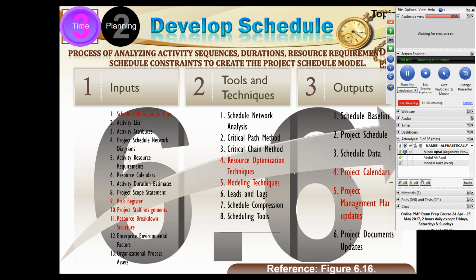Does this happen? Yes, sir, it can happen. But for being on the safe side, if we give a little bit of margin, not that much, is that okay? So we are confusing reserve with padding. A little bit of margin without a reason is a padding. If you can provide a reason, then this is a reserve. Got my point? Reserve is allowed.